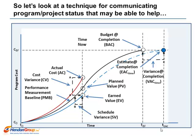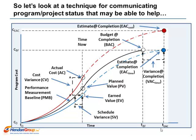The variance at completion for time is simply the difference in time between the budget at completion duration and the estimate at completion duration. Just as we did with determining estimate at completion for time, we can calculate estimate at completion for cost. Graphically, the way to think about estimate at completion for cost is the estimated cost where earned value equals planned value.